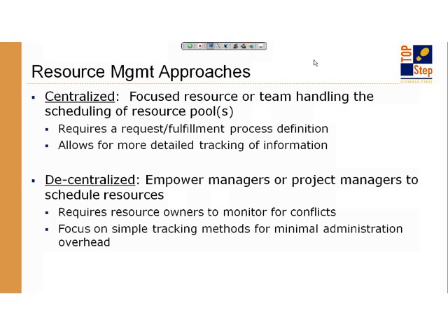Decentralized, definitely down to the project manager level. Grab who you can, when you can, and then negotiate as conflicts come up when the department managers are monitoring resources to say that you need something else. Gray area there, project managers involved in project management but doing it more from a request response or modifying their own resource schedules once they've gotten approval to use things. So there's lots of gray in the centralized, decentralized, and it's really a matter of who is responsible for doing what in your company and what is the dynamics of your organization. And we'll talk about some things to think about in those areas.